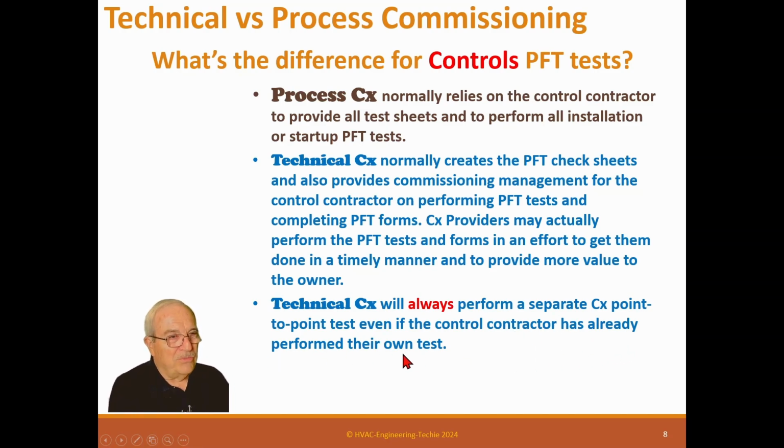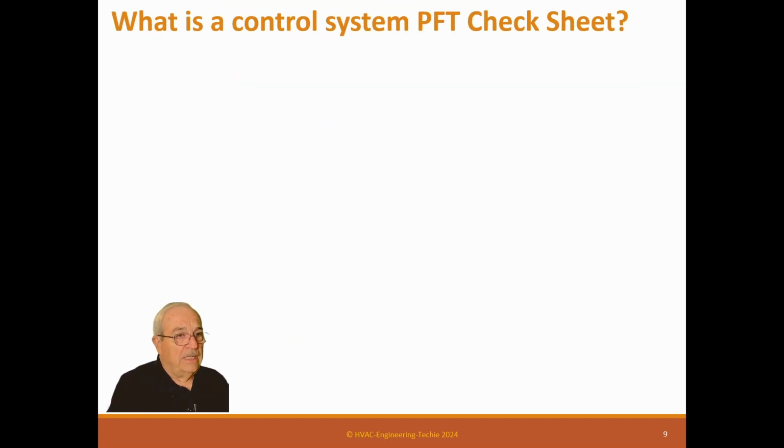Now, we say, well, why would you do that? Well, having been a control contractor, and I thought it was a good one, what happens is a control programmer or technician in the field will spend a lot of time working on the first prototype controller and program. He'll get out there and test it, make sure that works. Okay, now it's working. Okay, guys, take this piece of software and add it to the other 100 just like this one. They don't ever test it. They just load them in. They say, well, it worked there, so it's going to work here. There are too many variables. It's just not going to happen. So a lot of times they don't provide actually good function, even though they should.